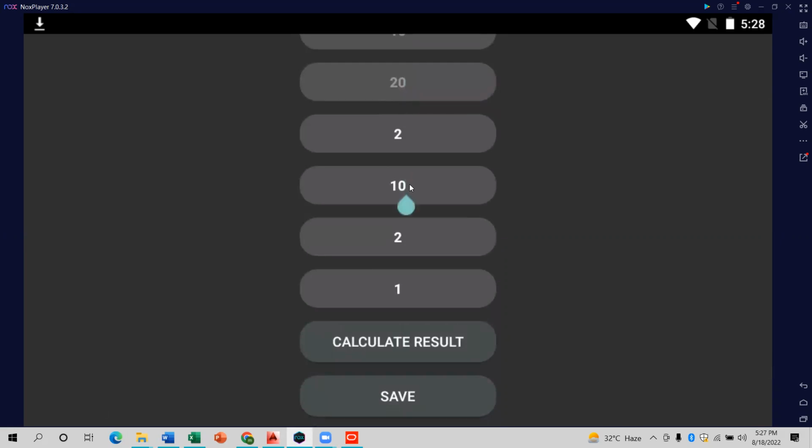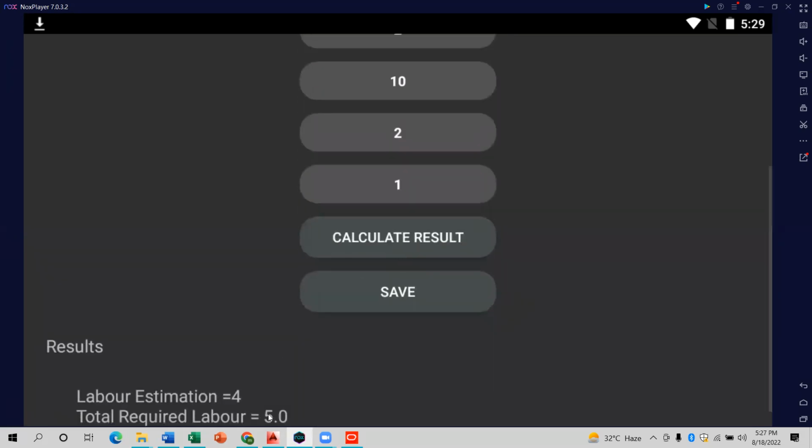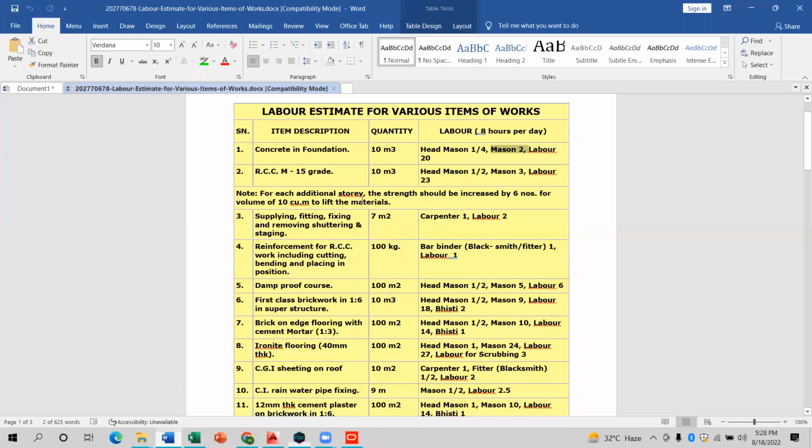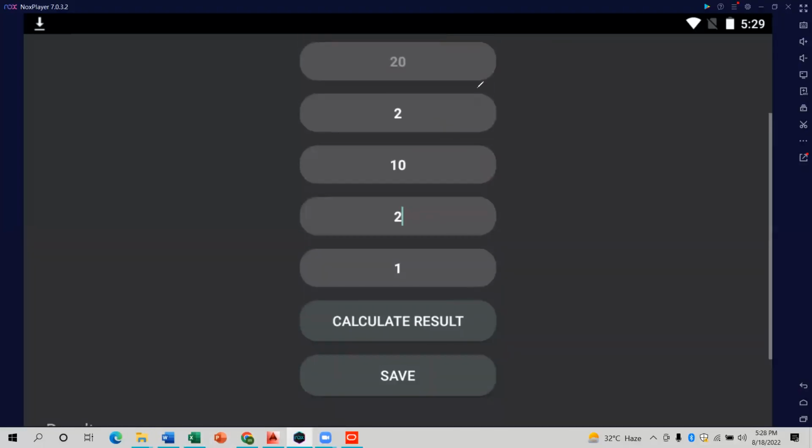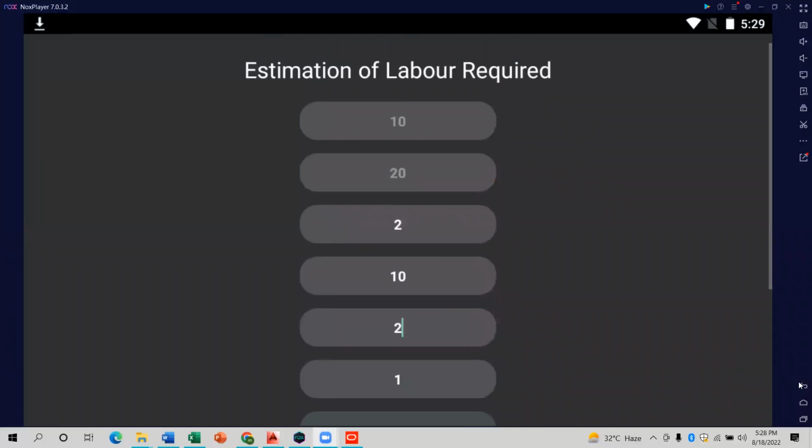And same, if you have 10 tons of steel, and a daily worker can easily fix 2 tons of steel, then definitely the total is 5 for you. You have to require it for the steel. So this worker is for the steel, and this worker is for the concrete. It means that the upper example is for this one, and the second example, what I have given, is for these three options. This one is a random example for the steel. Clear? So go back.